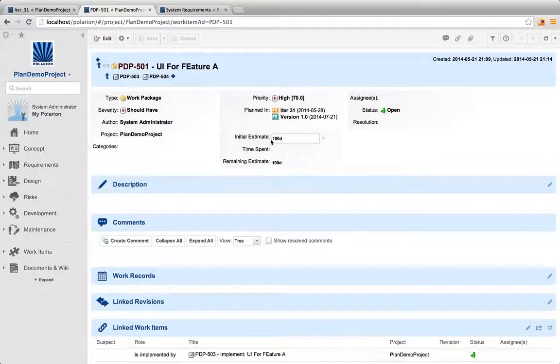Very often, the team first ensures the high level decomposition into the work packages, and then they create the actual low level tasks. So for the sake of the planning, the most important fields in our process are the initial estimate and remaining estimate, and this has to be maintained by the developers and adjusted manually as the tasks are being completed. So these 2 fields cannot be calculated from the children.